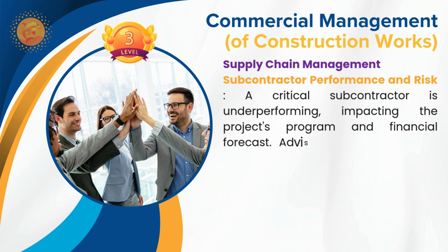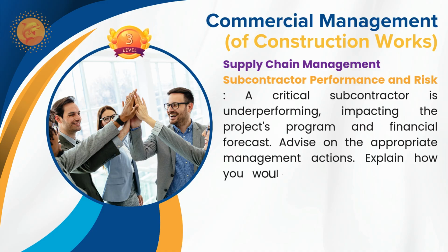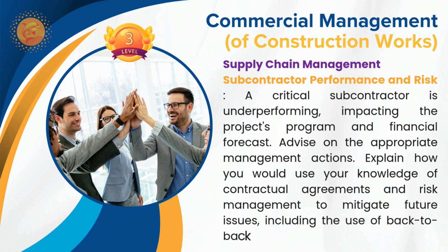So the employer is responsible for that nominated subcontractor. If he is not agreeing or not going to pay, the main contractor cannot do that. He is not responsible for the contractual value of the nominated subcontractor. The main contractor only has to carry forward the claim, defining why this situation is coming up and how the nominated subcontractor is entitled. The nominated subcontractor has to prepare and submit the claim, and it has to be forwarded by the main contractor without objecting to it. Then the employer has to take a decision.